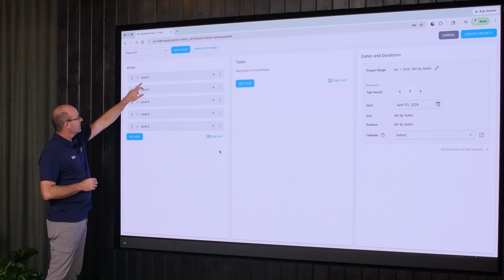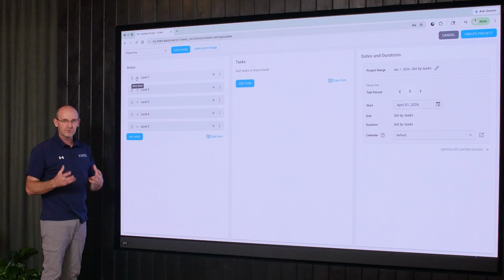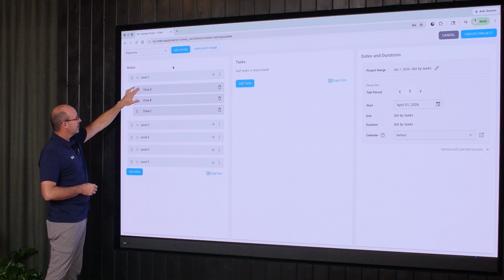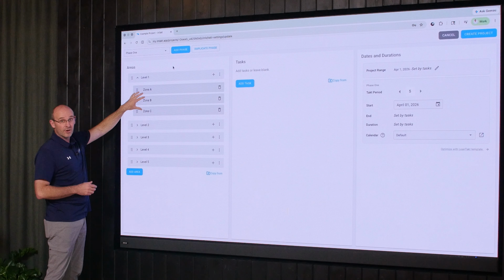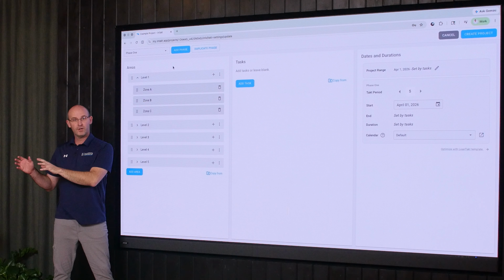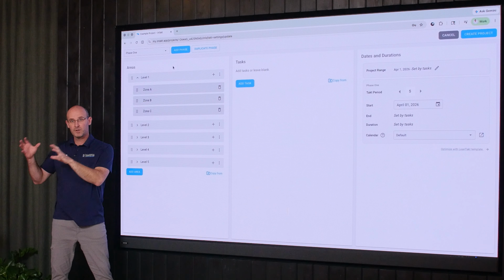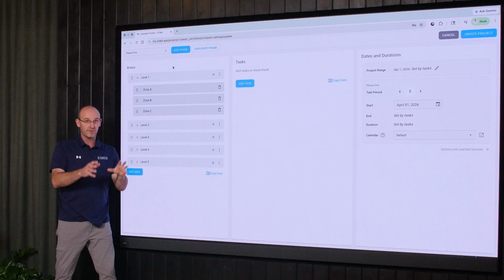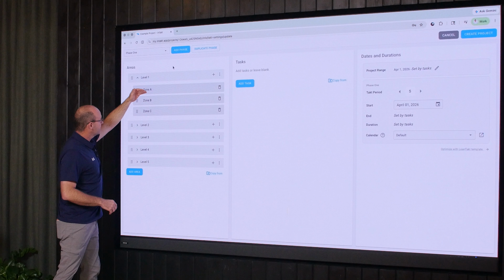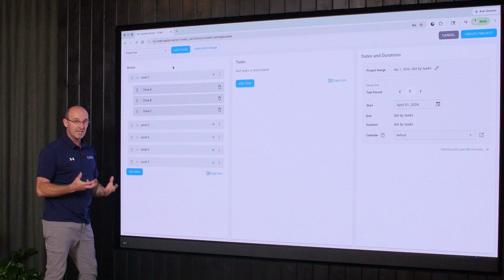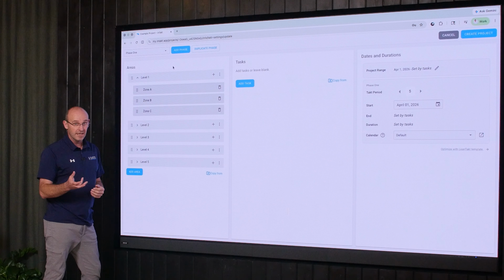You see level 1, level 2, 3, 4, 5, that naturally fits beautifully on the contract drawings. Then when you expand that, we have zone A, B, and C. These are your train tracks. These are the production areas where your train of trades, your sequence of trades, your crews will come in and plan, build, finish, plan, build, finish, and then it continues on. And you can see that breakout, and it's very, very easy to use.